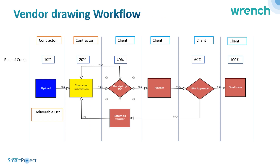For vendor drawings, where somebody externally is creating those drawings, you can have a vendor deliverable list and specify the process by which these vendor drawings are reviewed and approved through this workflow. You can specify what activities are done by the vendor and what activities are done by the client — whether it's a document controller or an IDC process — and rules of credit can be applied so that when activities are completed you earn the progress.